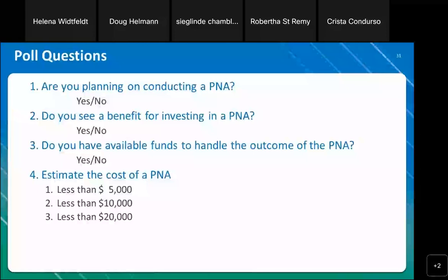But right, as you get to be a larger entity, you'll more likely be able to bid it on a square footage basis. Got you. And when you have more properties, when you bundle, you can negotiate and get it cheaper. But I just calculated the update alone for 120 units was $41 a unit. And again, it's just one dwelling building, a huge building with three stories. But the better you are prepared at the site level, as far as information that you can provide in a workable format, it usually helps lessen the cost. So that's one of the experience takeaways that I have.